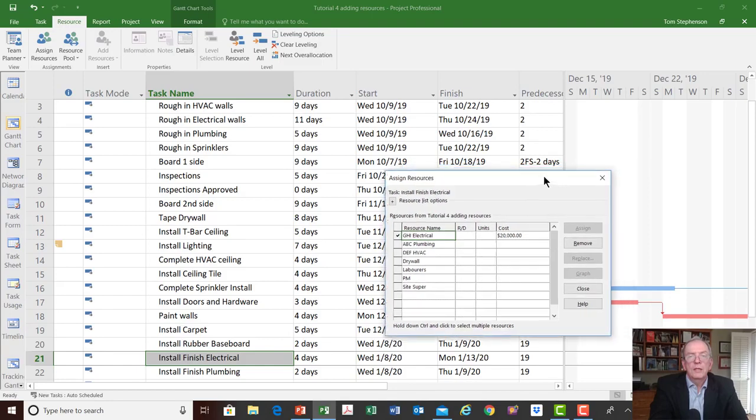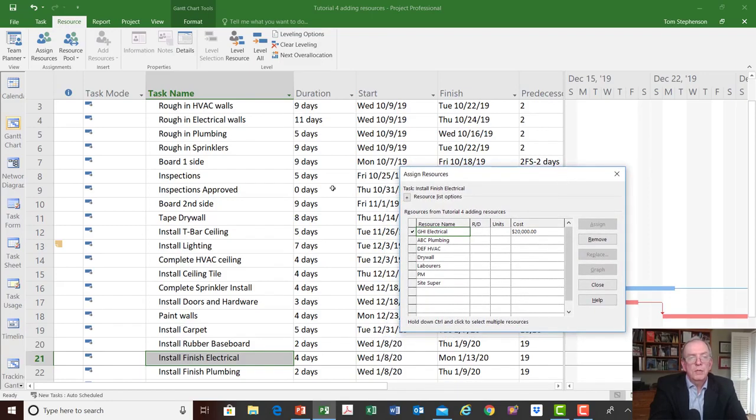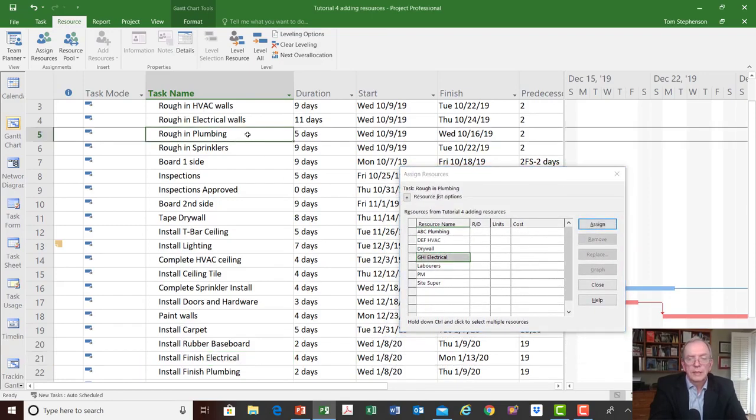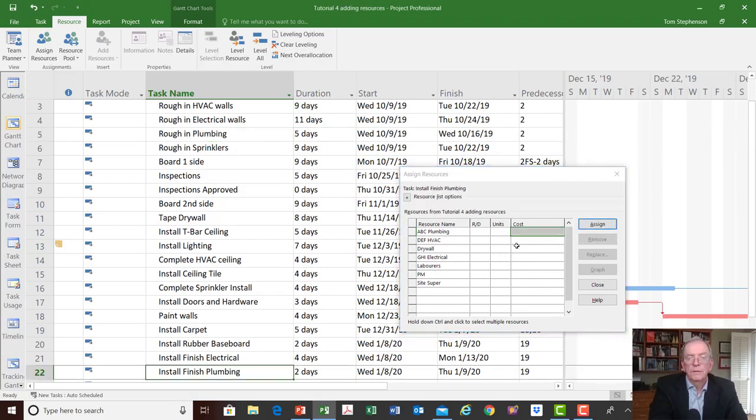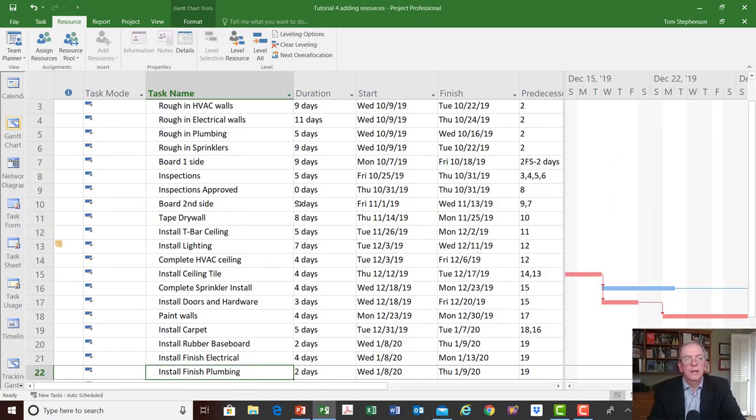Okay, so we've just done some assignments. Maybe we should do the plumbing one too. What do you think? Let's do the plumbing. So for the plumbing, we're going to say it's $30,000 in total. So I'm going to put $15,000 here, and I'm going to go down to where we've got finish plumbing, and put $15,000 there. So we just assigned those costs to those particular areas.